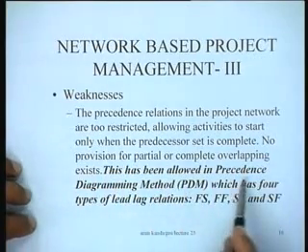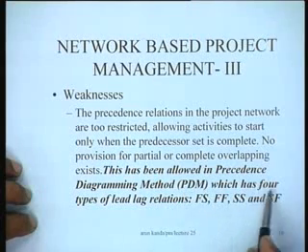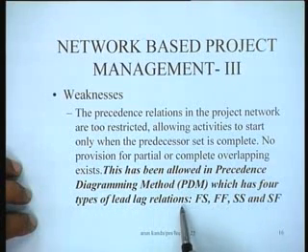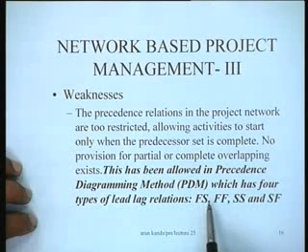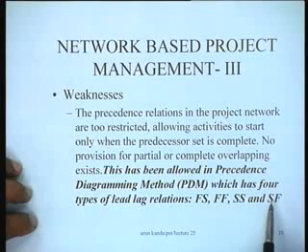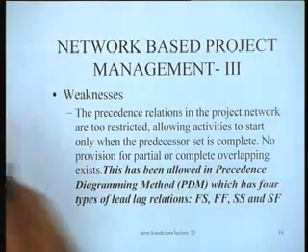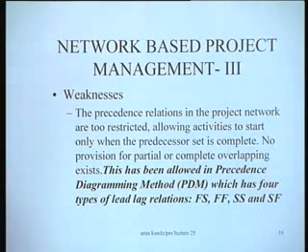So this has been allowed in precedence diagramming methods, which we have already seen, PDM, which has 4 types of lead lag relationships: finish to start, finish to finish, start to start, and start to finish. So if you have these kinds of lead lag relationships, we basically have a mechanism to expand the precedence relationships from a simple finish to start lag to including all these 4 types of lags.